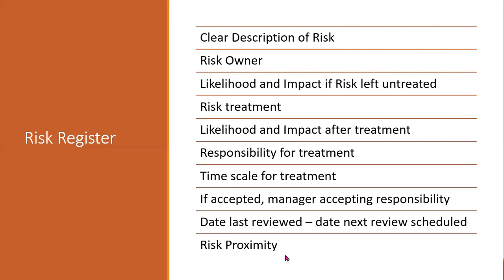What is the risk proximity? Let's give an example again of a data center. So we're saying we want to relocate or move our data center to a county where there's been a lot of rain over the past 5 years in winter or in the autumn, in the fall. That is around August. A lot of flooding in that area. If the risk is accepted, the closer we get to August, the more the likelihood of the data center being flooded.